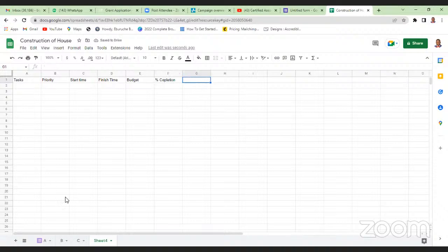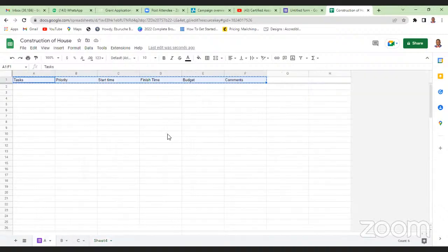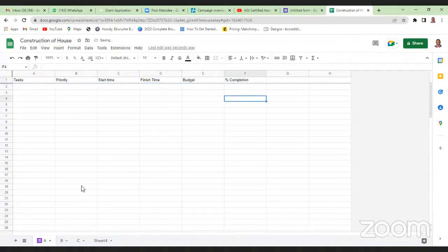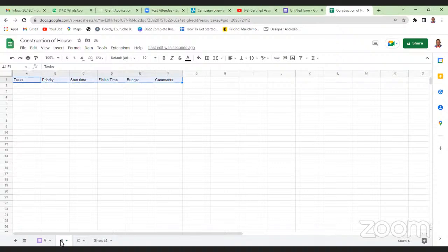Now, if project B depends on project A finishing before B will start, by the time I look at the percentage completion for project A, I will know exactly what project A is up to. If project A is supposed to take 10 days and is already taking 8 days, and the percentage completion is not yet where I think he or she will finish, and I'm the one handling project B, and I'm supposed to start in the next 2 days, I can quickly raise a red flag.